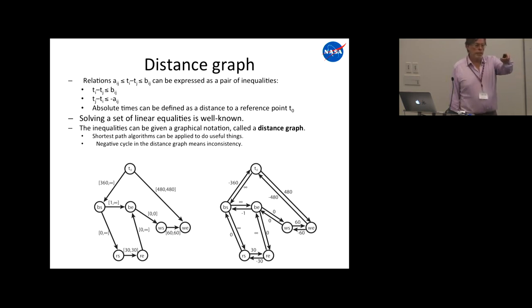So the example we gave, where there was a failure of dispatchability, is because if we had run an all-pairs shortest path algorithm on that network, it would have discovered that constraint. That's the output. So I wouldn't view it as an optimization. It's more a view of uncovering all the constraints that are implicit in the problem.